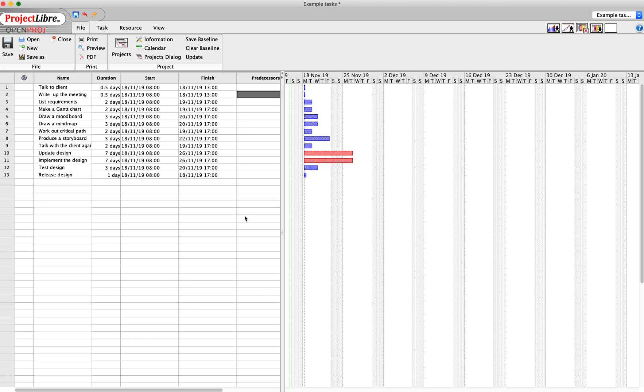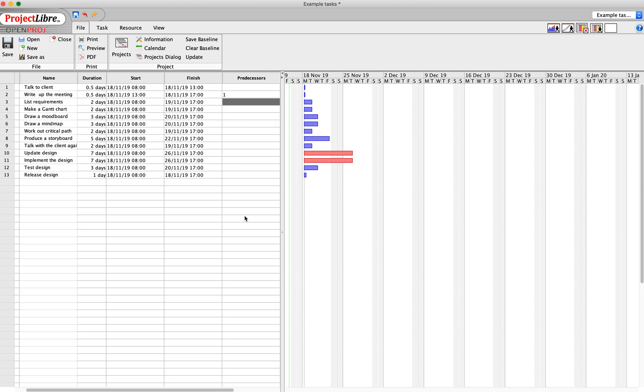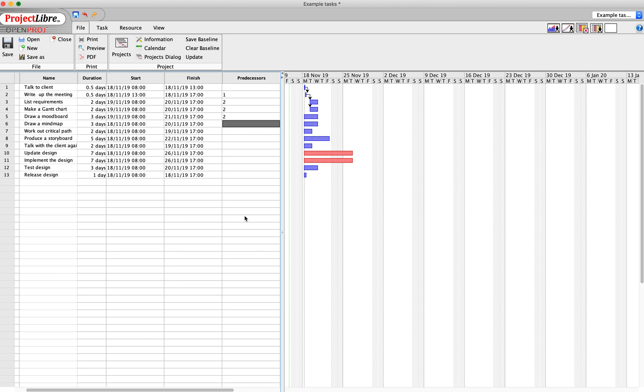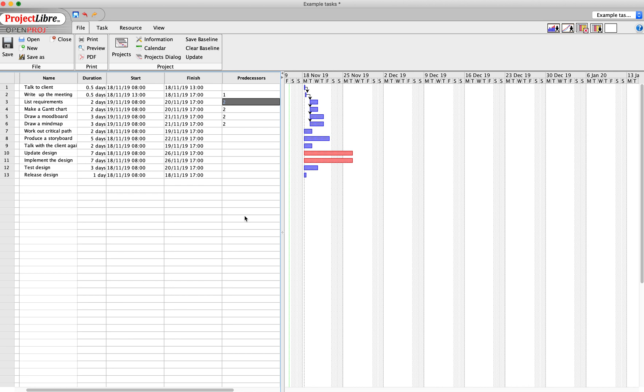So the predecessor to writing up the meeting is talking to the client. After you've written up the meeting, you can list the requirements. You can make a Gantt chart, you can draw a mood board, you can draw a mind map - none of those are dependent on each other. You finish the meeting and then different people can do those. The critical path is going to follow up from my Gantt chart.